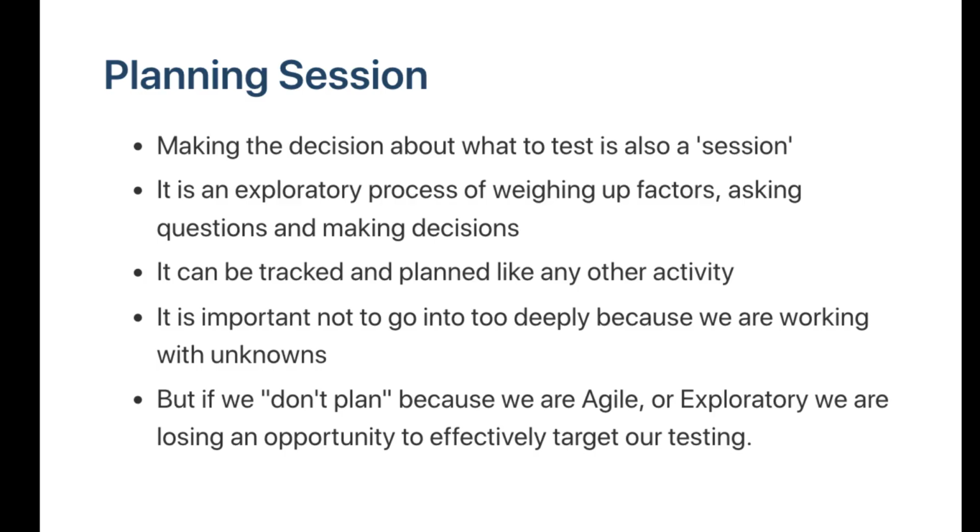Now, the planning process itself is an exploratory process, right? We're investigating what we want to achieve, what are the aims, what are the questions, what are the factors involved, what are the risks, and it's a decision-making process. We can track it and plan it like any other activity. If we know that we're going to have to do a whole bunch of testing, we can plan in a planning session before that, which might only be 20 minutes, and think through what we're going to do before we actually do it. Planning can be planned.